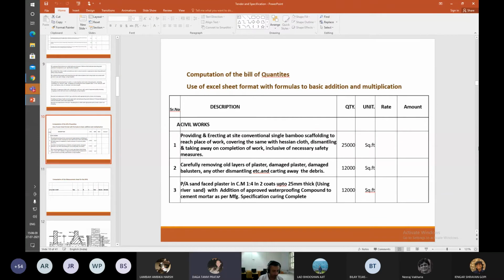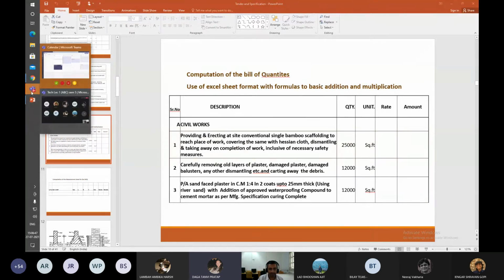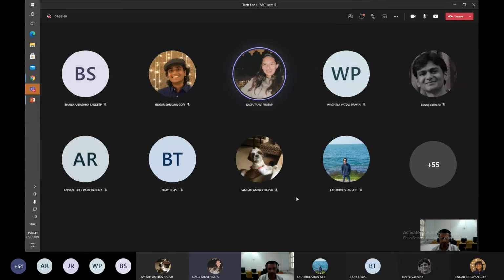Sorry, Jimmy, I have a question regarding the last thing you said about the number. As you're saying, the measurement column needs to have the same numbering as the BOQ. So for example, for excavation, the first thing is a bigger cuboidal excavation, and then excavation for smaller footings which are separate. So both of them will have the same number. Serial number is one only. And in the BOQ, it will correspond to the excavation part.